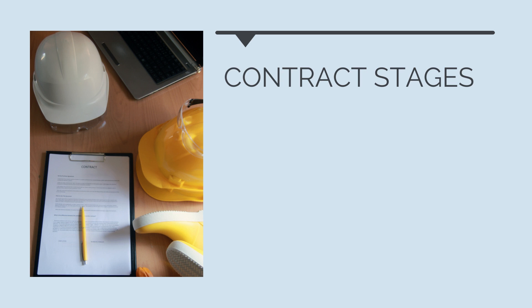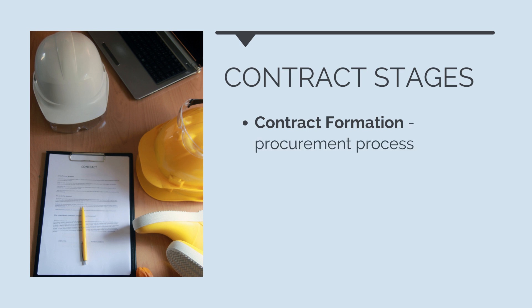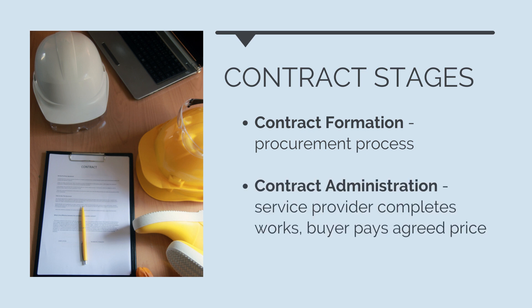There are really two key stages in contract management. The first is the contract formation stage, where the contract between two parties is formed. In construction management, this is the procurement process where a client or project developer finds and selects a head contractor, or the head contractor finds and selects subcontractors. There are certain minimum requirements that need to be in place for a contract to exist. Next comes the contract administration stage, where the service provider or seller organisation completes the contracted works and the buyer organisation pays the agreed upon price for it.